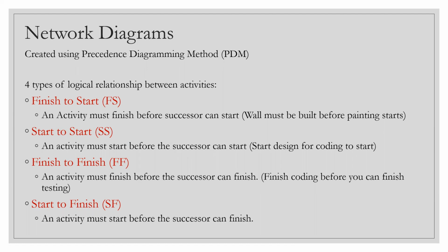The last one is start to finish. It is rarely used. Personally, I've never ever seen this being used. It talks about an activity must start before the successor can finish. So remember once again, finish to start is the most common one, the most popular one, and the PMP exam normally focuses on the first one itself. If not explicitly mentioned, then always go with the first one, finish to start.